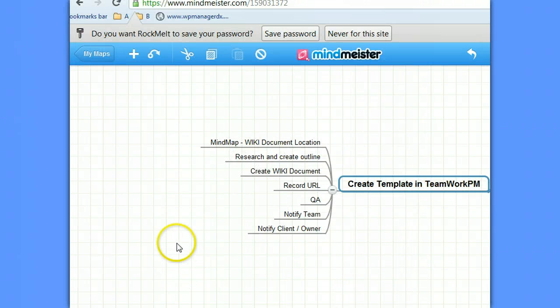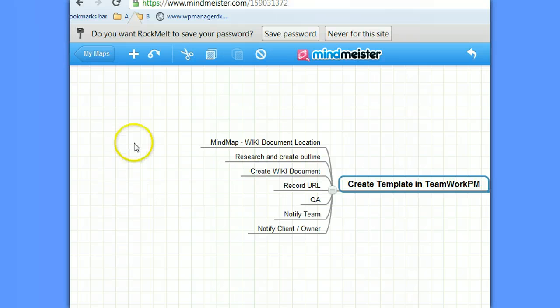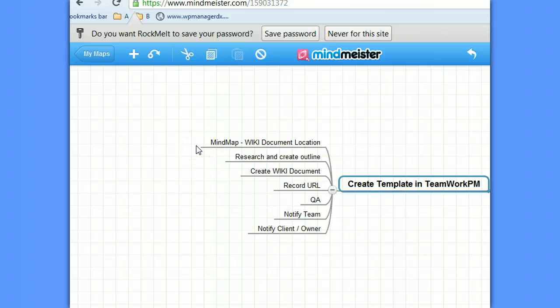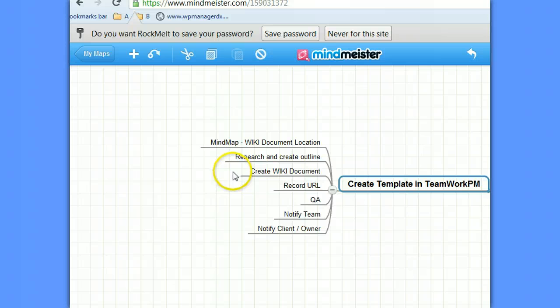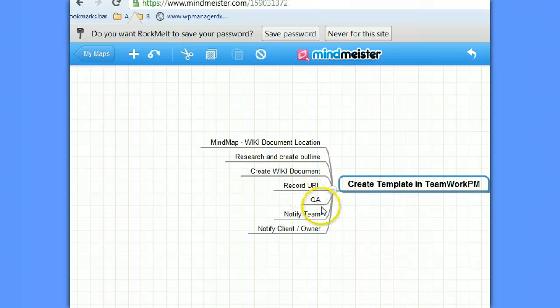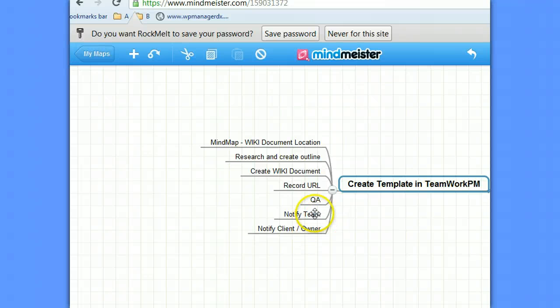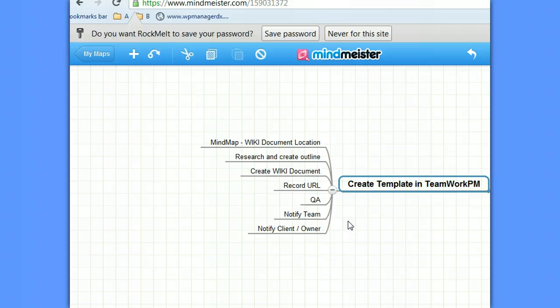So we've worked out that the steps required is to record the wiki document location in a mind map, research and create an outline for the document, create the document, record the URL so that we can tell people. In particular, we're going to tell the quality assurance person who's going to check the work. The QA person is going to notify the team, probably using a social collaboration tool like Yammer.